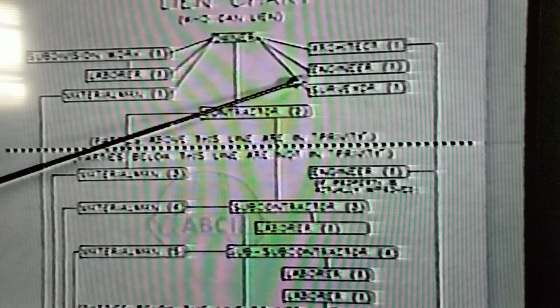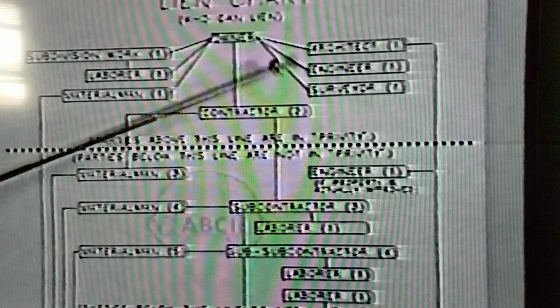So we could have a situation where the owner engaged the services of these folks, but the subdivision never went forward. And the argument might be, well, gee, they don't have the right to lien because there was no work involved in the field. However, if these professionals are directly connected to the owner, and if they have performed their work, whether or not any work actually gets done in the field on the project is irrelevant to their right to claim a lien.